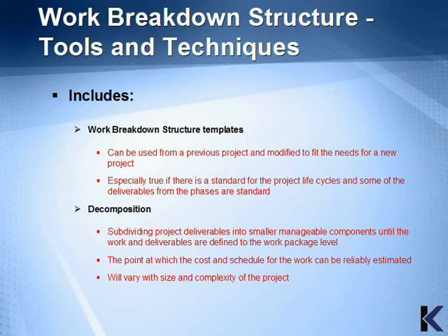There are two tools and techniques for creating the work breakdown structure. They are the work breakdown structure templates and decomposition. Work breakdown structure templates can be used from a previous project and modified to fit the needs for a new project. This is especially true if there's a standard for the project life cycles and some of the deliverables from the phases are standard.